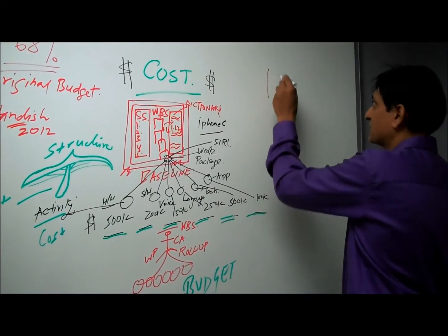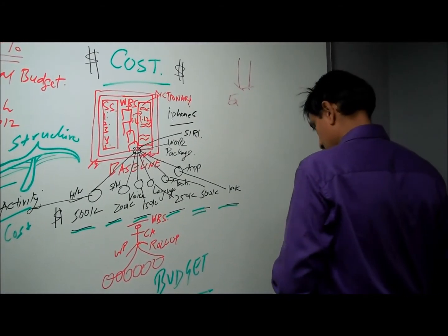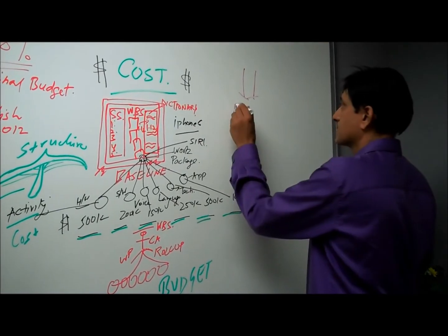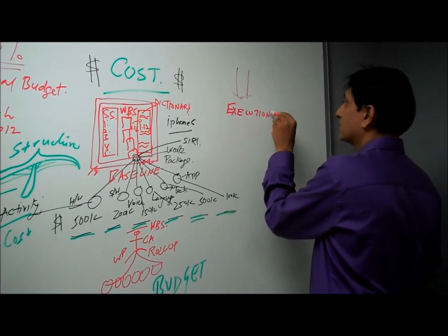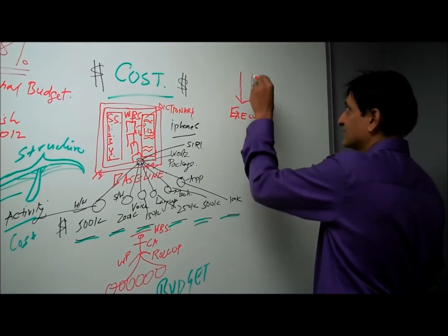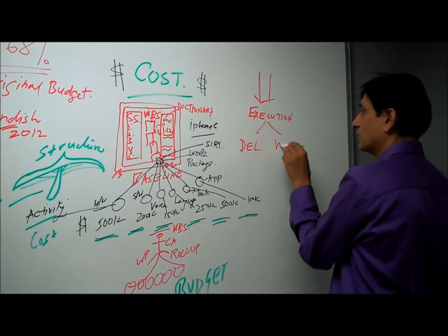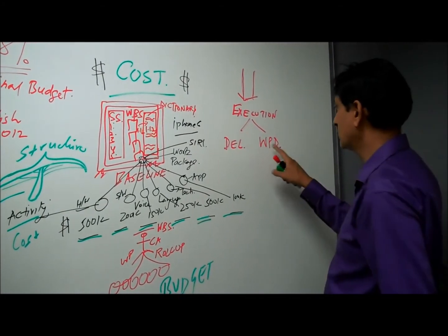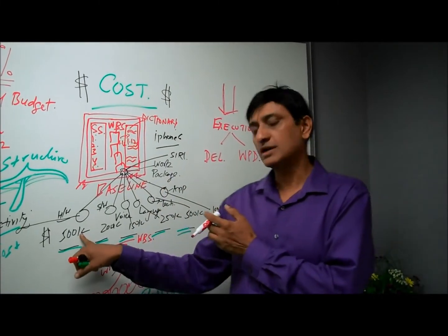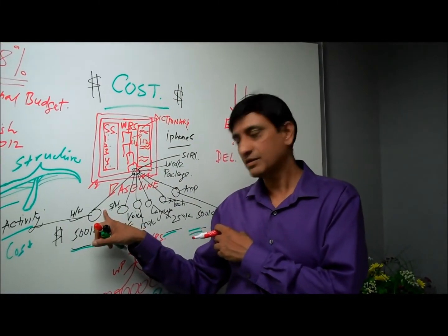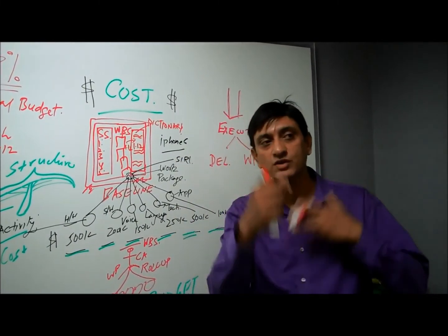What we're doing is we are executing the project. Execution of the project leads to creation of deliverables and work performance data. Now what is that? Data about the performance of the work. So what's the status right now? You're supposed to spend $500,000 on the hardware and complete the hardware. Right now you've spent 200K and completed 30% of the work, good or bad. So that is what you're trying to control.